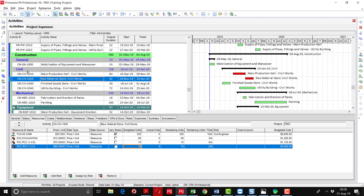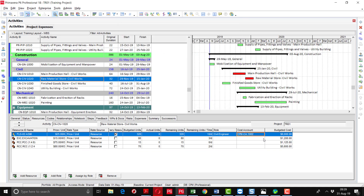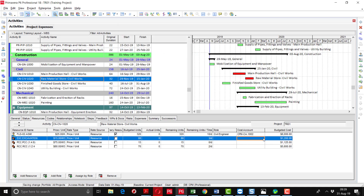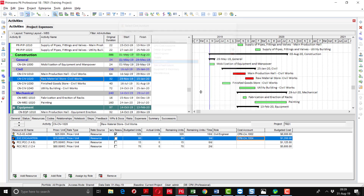After assigning the resources and adding the budgeted units, we have to select the cost account. Field engineer gets its cost account, and excavation will come under the cost account of construction.